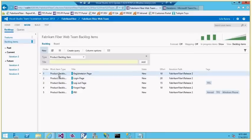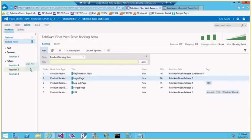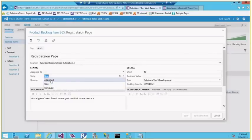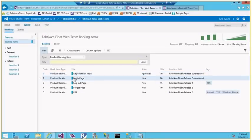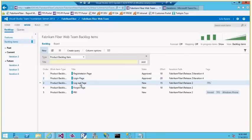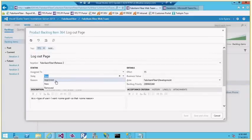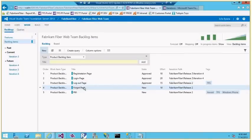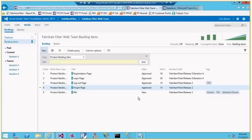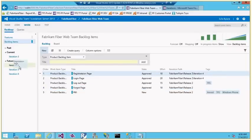Before dragging items into the iteration, there's an important step: the product owner must approve the items. Once approved, the team commits to working on them. The business analyst or responsible person creates the items, the product owner approves them, and then the team commits — meaning they agree to complete those items in the specific iteration. Here the team is committing to complete these items in Iteration 4.